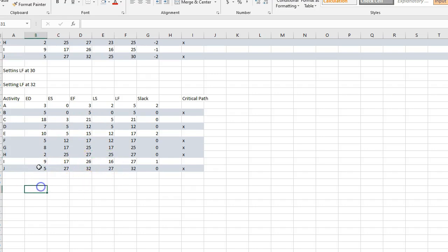And so if this said, you know what, my expected duration for activity 1 is actually, let's come back in here, and it is only 4 units. So now I'd have to recalculate. Early finish would be 4. And so notice that would change, and that would change my slack. If I change that all to 5, well, I know that it is going to finish early at 5.